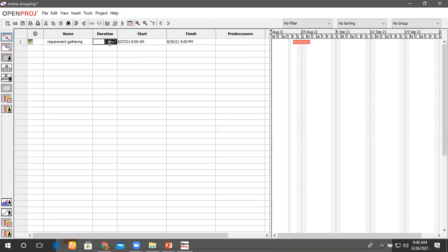The duration is 2 days. Start is 27, that is tomorrow, and it will take only 2 days, but there is a Saturday and Sunday that is off, and the next day will be included. That is, your 27 will be there, 28, 29 is holiday, then there is a 30, that is Monday. Okay, that is included, 30th. Okay, and here it is a Gantt chart. This chart is your Gantt chart.